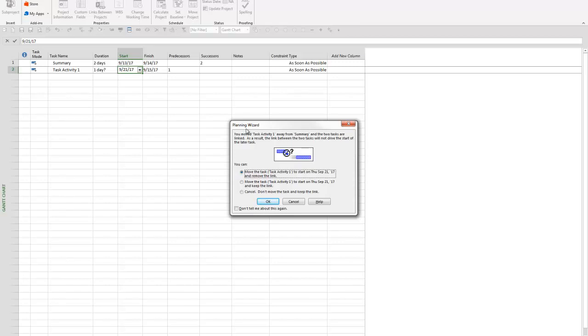So this is a great notification that Microsoft Project is warning us about, because if you look at our dependencies, I'm saying that the successor to row 1 is row 2, and based off my manual input, now keep in mind this is a bad practice that I'm doing. We are not recommending to change the constraint type to anything else. Although this is just an example. Because I've come in here and I have my dependencies in place, it's giving me this warning that the date that I'm punching in manually is going to be different than the date based off the dependency I've built.